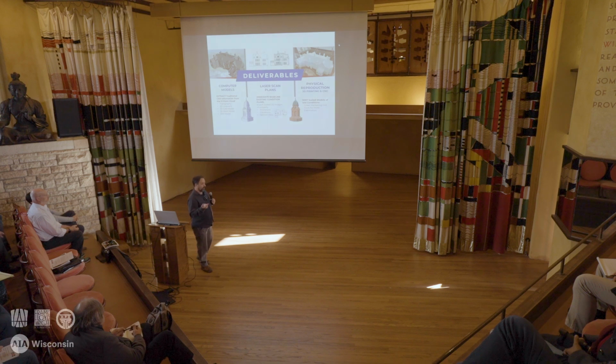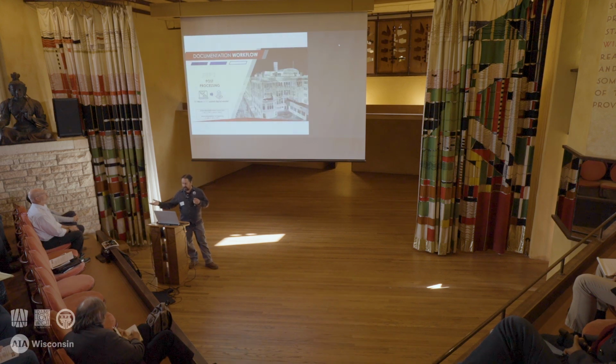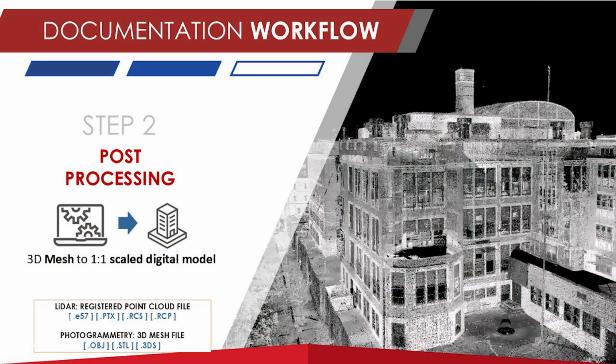Whereas if you're on site with one of these devices, it comes down to one visit. Now that one visit may take you 2 weeks. Think back to a project like this, similar to one I was included on. It was 2 teams, 2 scanners, and it took us 2 weeks. So it's a tremendous amount of hours, and a tremendous amount of data.